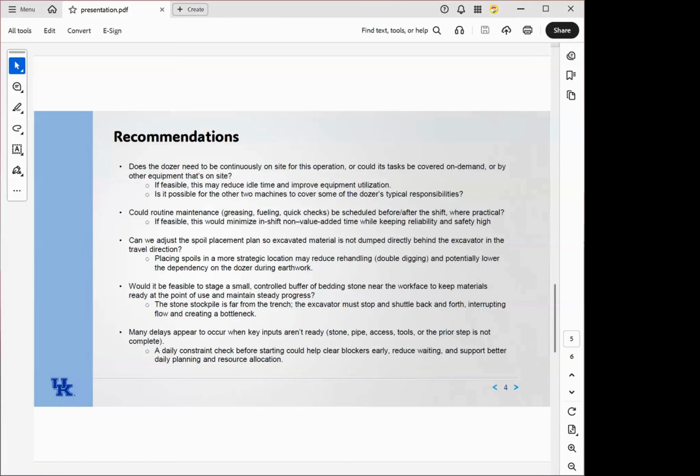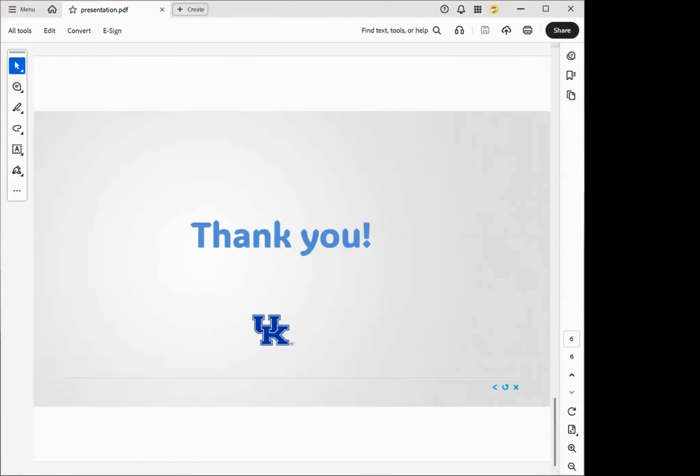Yeah. And then in our previous slide, we showed a defect. It actually wasn't a defect for that particular activity. What happened was when they were moving the pipe over to the trench location, they dropped the pipe onto part of the silt fence, which damaged the silt fence and caused the defect. So then that's just added work that has to be done to correct that silt fence later too. So those are all of the things that we had to present to you. Any thoughts?